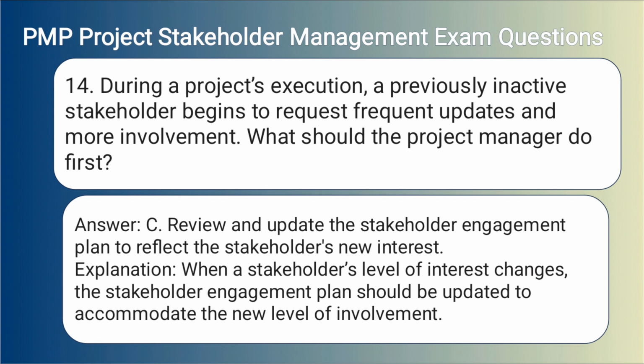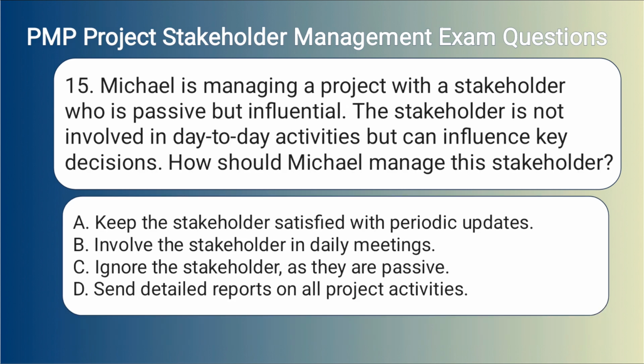Answer: C. Review and update the stakeholder engagement plan to reflect the stakeholder's new interest. Explanation: When a stakeholder's level of interest changes, the stakeholder engagement plan should be updated to accommodate the new level of involvement.